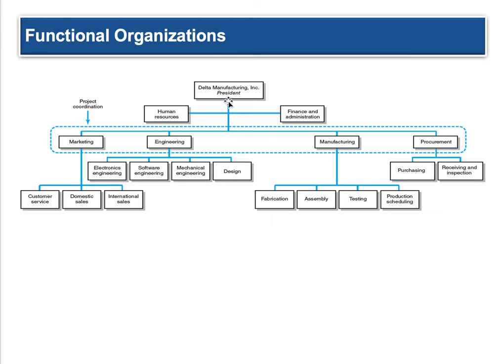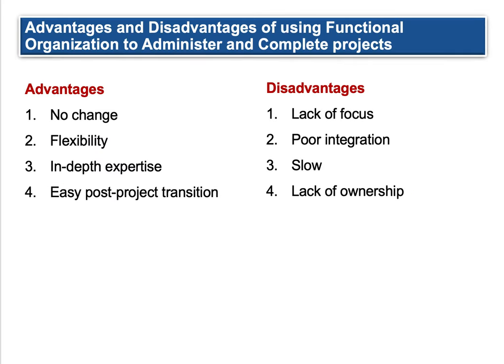This looks like a traditional structure. You have a president up top, human resources, VPs, and CFOs. Then you have all the major departments: marketing, engineering, manufacturing, procurement — obviously this can differ across organizations. Within marketing you have customer service, inside and outside sales, domestic and international. Engineering has all its different departments, and manufacturing everything needed to make a product, while procurement is like supply chain. The project is divided across these departments as additional responsibilities, so it stays within the same corporate structure. Advantages include no real change to the corporate structure, flexibility across departments, in-depth expertise from marketing, engineering, and manufacturing, and easy post-project transition because nothing really changed — you just take it off their plate.